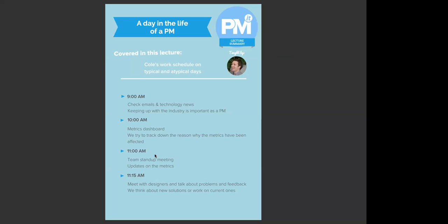So planning is not done in a vacuum. You do this with your entire team involved, and they have an input. Because you might be prioritizing something that you think will take only 2 weeks, but will actually need 2 months, right? Because engineering can say, hey, hold your horses. That sounds simple, but there's a dependency issue with this other team and whatnot, right? So that way, the team always knows what is going on, and they can give any objections.